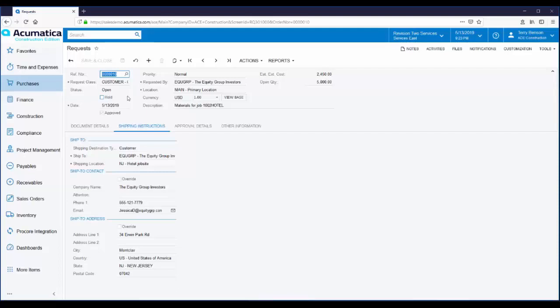The next step in the process is to create a requisition. A requisition is used by purchasing for several different things. It lets them assign a vendor. They can put a requisition through another approval process if necessary and if the request is for a one-off item. Maybe it's a very large purchase. They can even send out email requesting bids from various vendors.